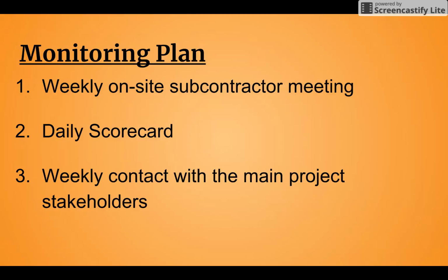The monitoring plan. I would say that one of the most efficient ways to monitor the weekly progression of the project and to make sure that all problems are being dealt with will be the weekly subcontractor meetings that I mentioned earlier. That will involve one team member from each sub attending a weekly meeting in another building that's in the same business park as this building.